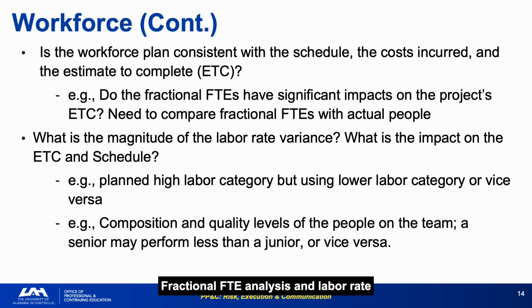Fractional FTE analysis and labor rate variance assessment are the two workforce questions most frequently skipped because they require connecting people-level data to cost-level data in ways that most reporting systems do not automatically facilitate. Fractional FTEs add up. A program with 40 people each billing at 0.8 FTE has a real workforce of 32, which has direct implications for schedule, productivity, and the EDC that are invisible in the headcount number.